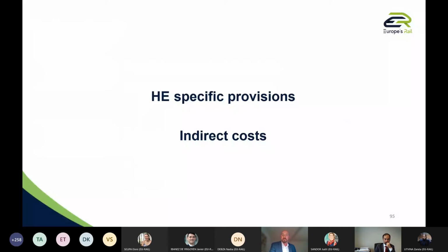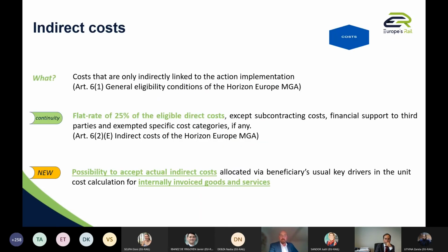Indirect costs, this doesn't change. It is automatically captured. Next, please, Giorgio. Automatically in the financial table, you get a flat rate of 25%. So in the next section, when I will present the detailed financial Excel file, you will see that there is a section for indirect cost, 25% of the different cost categories. It's embedded immediately in the system. Next.